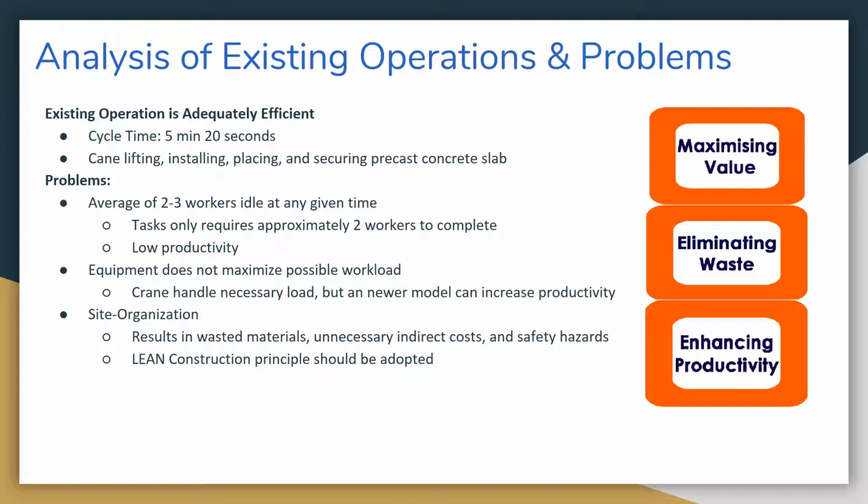Additionally, when reviewing the construction site footage, minor problems such as material organization and vehicle placement add unnecessary costs and time to each cycle. The scattered materials and randomly placed vehicles result in obstructed walkways, which can decrease productivity as well as increase waste and safety hazards. Low productivity, high waste, and safety concerns are all potential variables for profit loss and should be addressed.